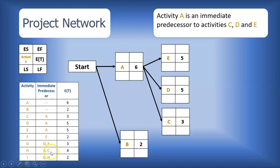Looking further down in the column, we notice that activities B and C together form immediate predecessors for activity H, which means it's nice to have activities B and C fairly close together to avoid crossing lines in our network. Now, we prefer not to have crossing lines, but in some cases they are unavoidable. So while we try to avoid them to have a neat looking diagram, there are times when they are unavoidable and we just have to have our lines crossing.